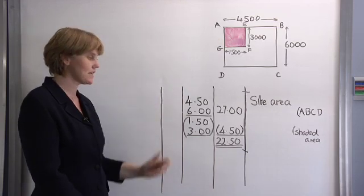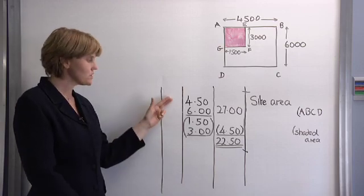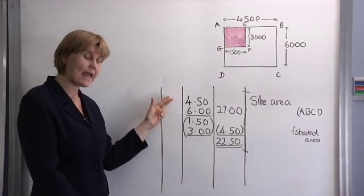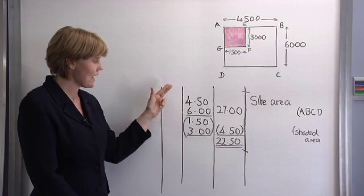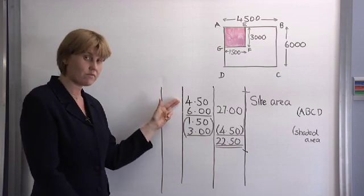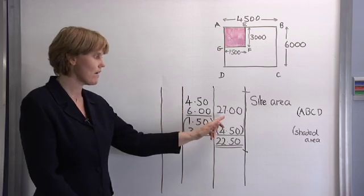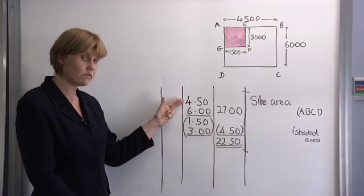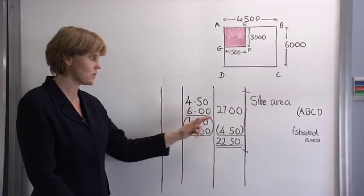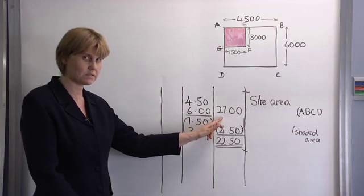Let's have a look at our take-off. So first of all our site area ABCD, we have 4.5 metres in length by 6 metres wide giving us a total area of 4.5 by 6 metres equals 27 metres squared.